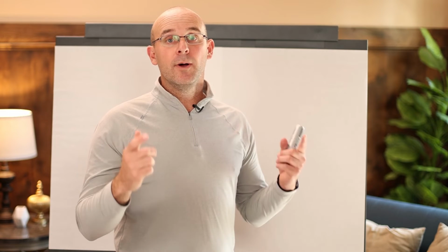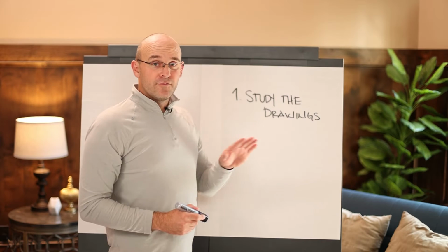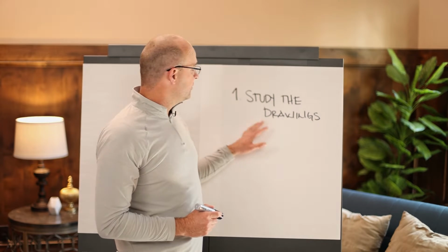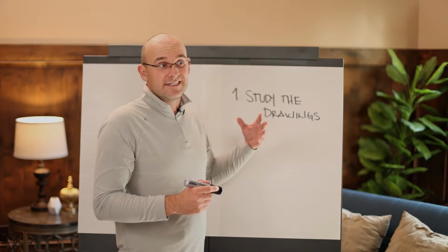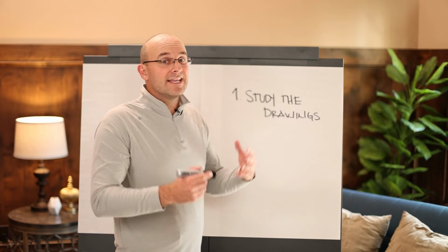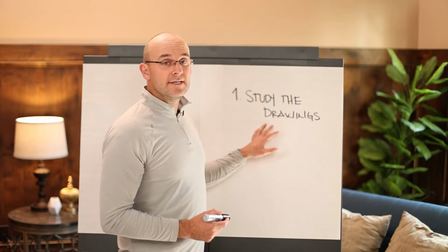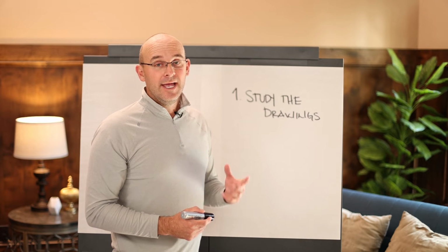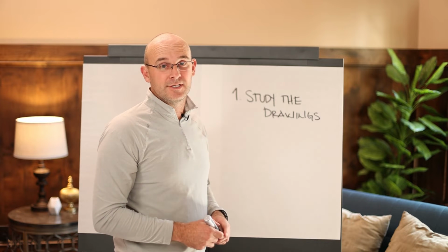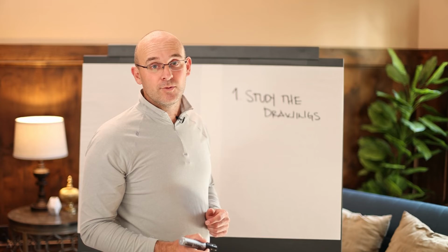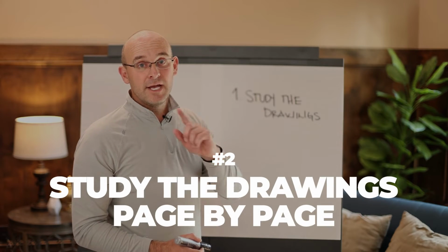You're going to want to go page by page. So first and foremost, when you get on a project, you're going to want to study the drawings. That means get an overview, a high-level understanding of what that project is going to be. And then once you have that, you have a general vision of what the project is going to be. Then you're going to want to study the drawings page by page.